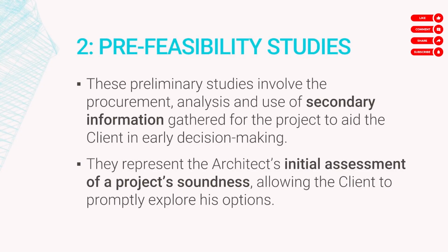How do you do the study? Well, marami kang gagawin, pero for me, the keyword is secondary data or secondary information. Pag sinabing secondary information, this is information na hindi ikaw personally nag-gather. Like parang meron kang survey na nakita and may resulting survey. Hindi ikaw yung nagpa-survey, pero may survey kang nakita and may data from the survey. Kasi kung ikaw yung nagpa-survey, ano yun? Primary information yun, primary data yun. So pre-feasibility study, you don't need to gather primary data. Secondary data is fine. Again, this study represents your initial assessment of the project's soundness.